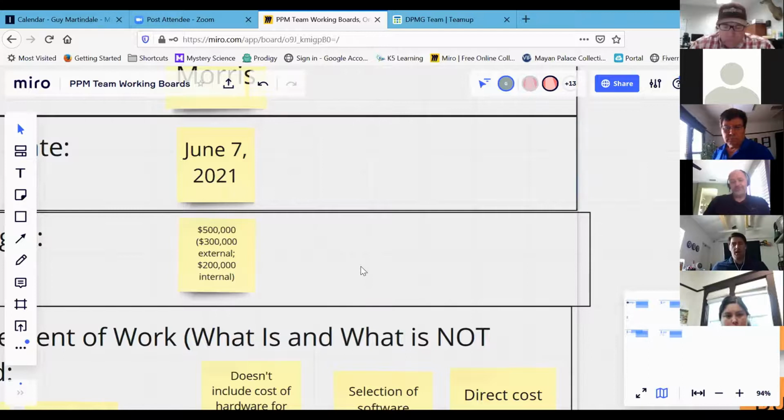So Brad and team, you're going to be comparing the $500,000 to what the total of the WBS outputs for you based on the hourly rates that you've created at the end of this. So when you put all your homework together, you're going to see how close you are to that number above and beyond or below. And then as with the rest of the teams, figure out, well, why are we low or why are we high?